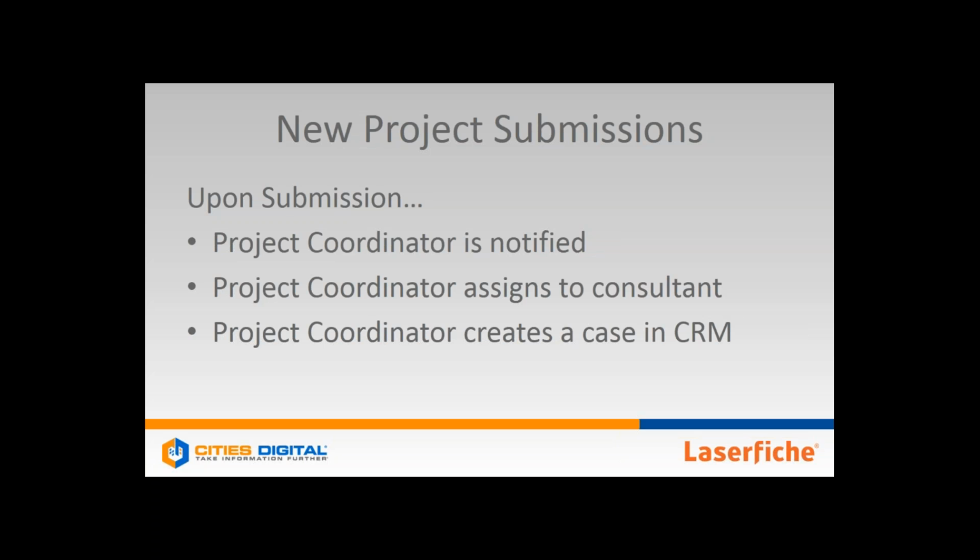There are some deadlines built into this process that require the project coordinator to attend to this within a day of being notified. One of the things account reps wanted to make sure of is that the ball doesn't get dropped, and understandably so. So we built in some deadline activities that will copy you if deadlines are missed, so that you know: I submitted this a day ago, and it looks like this hasn't even been assigned to a consultant yet. What's up with that? Let me check into that, find out what's going on, and remedy it.